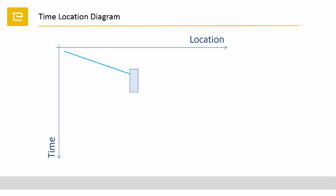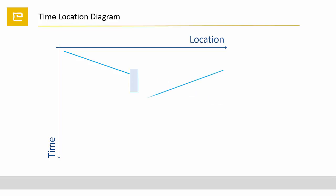Then you have some possibilities that can be displayed and explained very nice in a time-location diagram. You may stop the linear activity and wait till the local construction is finished. You may jump over the local construction and come back later to this area. And finally you may move the whole equipment and do the rest of the line from the other direction.